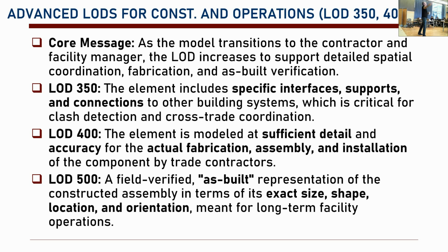In LOD 400, the cable was coming from there. In reality, it came from here. Not that big of a difference, but still a difference. Okay? Or we put these pipes, and we have these valves. Now, in LOD 500, we also put the brand for the valves. What brand?